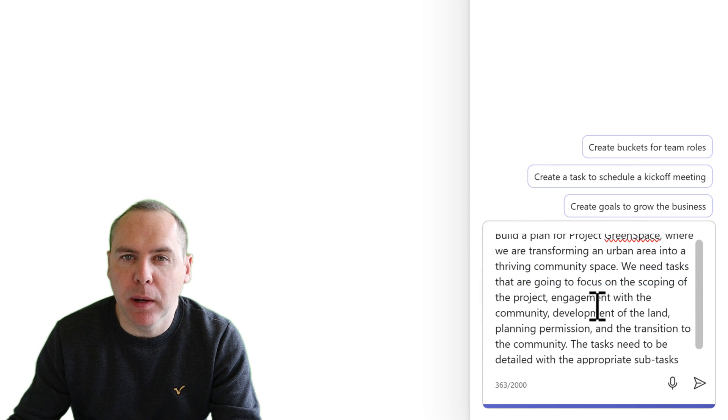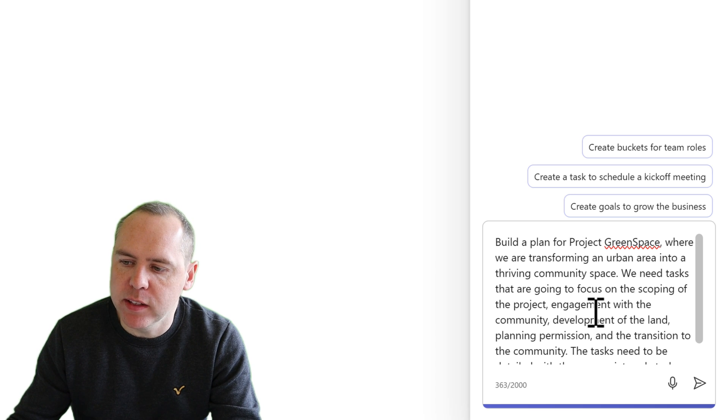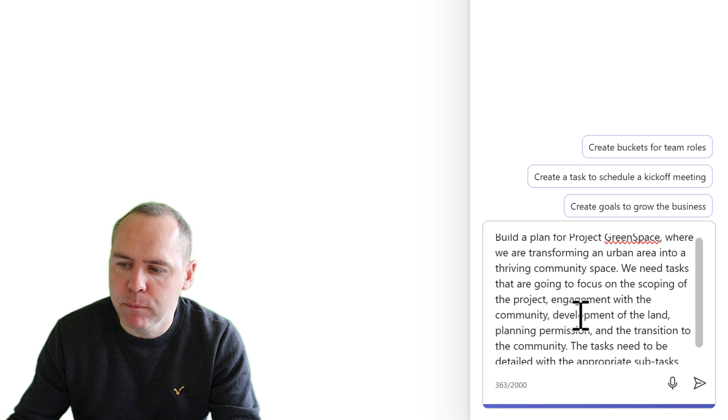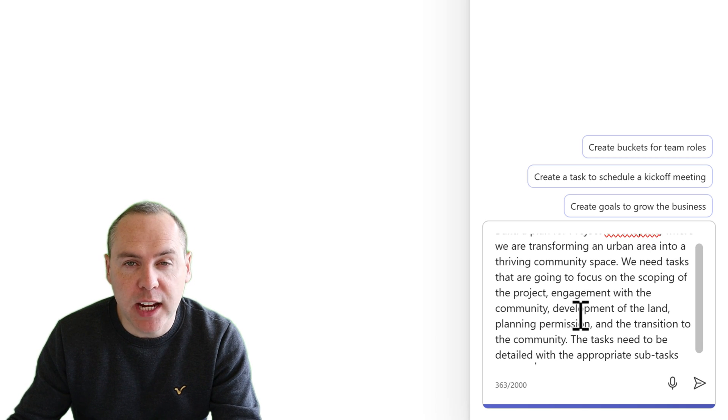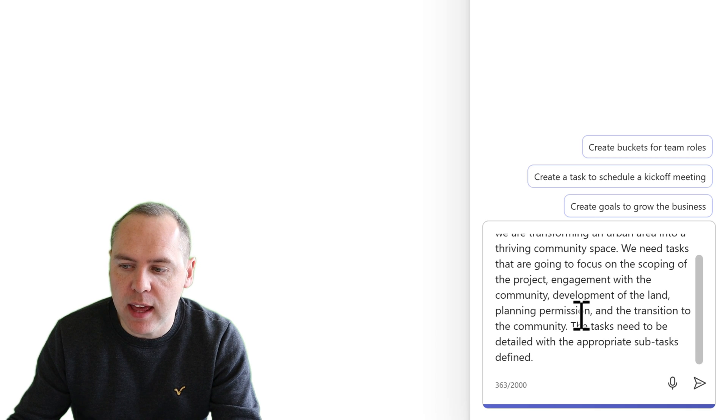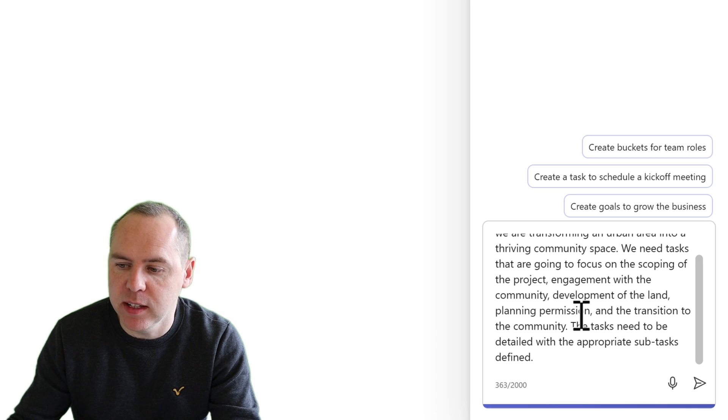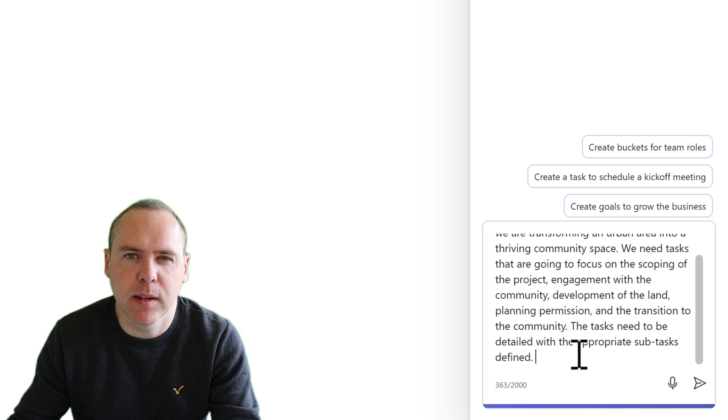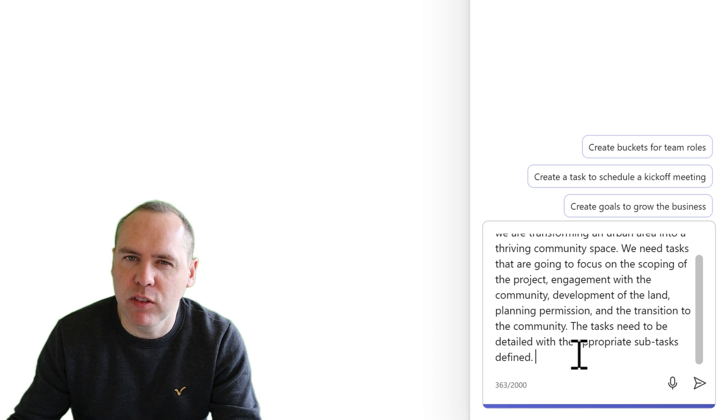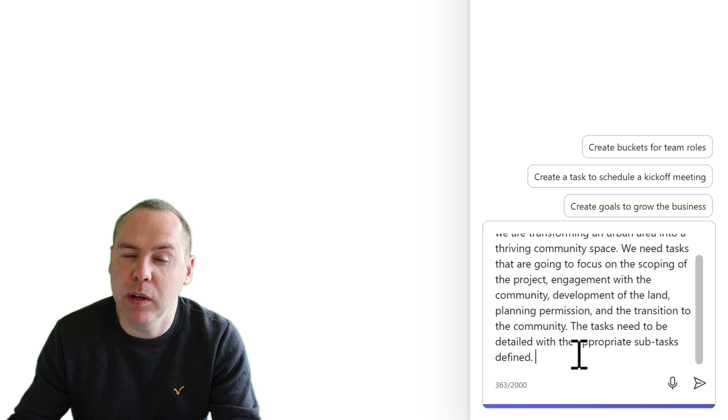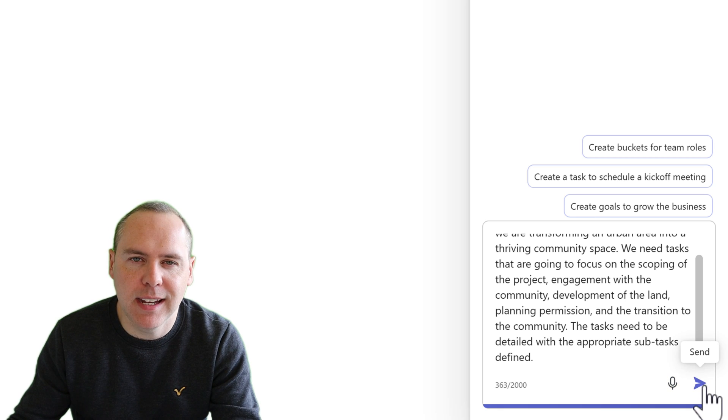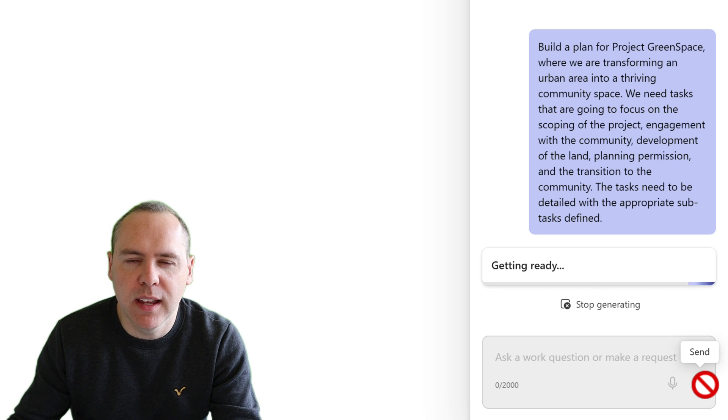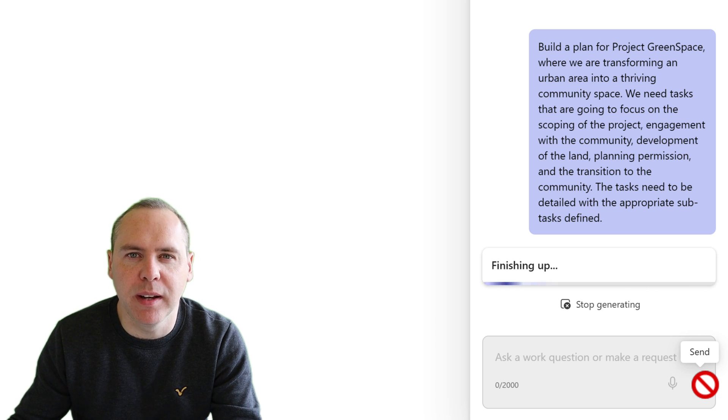So our prompt is now complete. Here I'm asking Copilot to go and build a plan for Project Greenspace. We're going to be transforming that urban area. We need tasks that are going to focus on the scoping of the project, engagement with the community and development of the land, and then planning permission and transition to the community as well. And also I need tasks defined with the relevant subtasks. So I'm not giving Copilot that much information but I'm guiding it into some of the phases that I would expect to see as part of this project. Now with that done, let's go ahead and send that into Copilot and Copilot will analyze that just like you see in Microsoft 365 and begin to build us a project plan and tasks aligning to it.